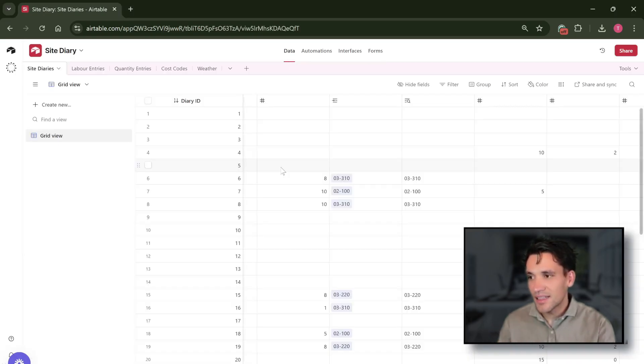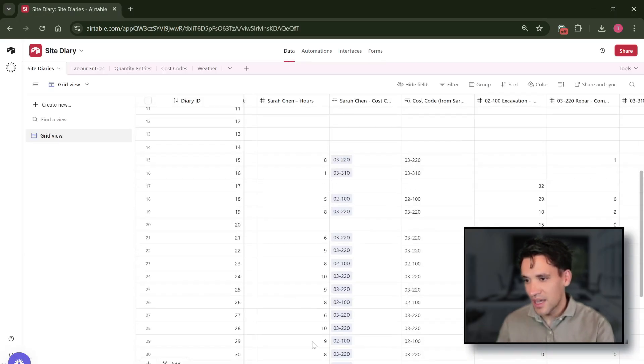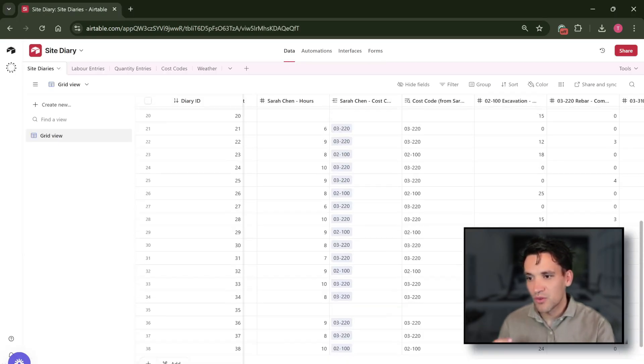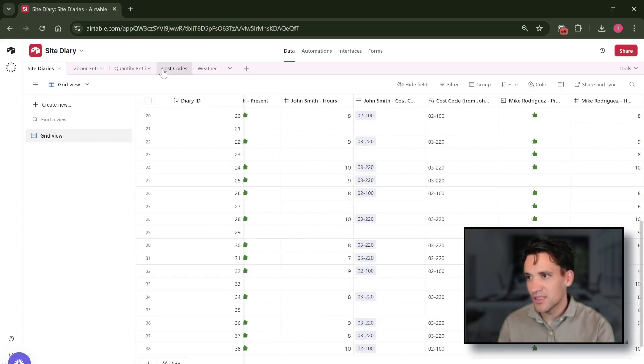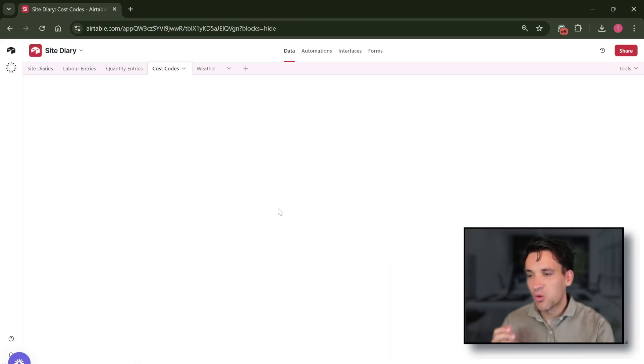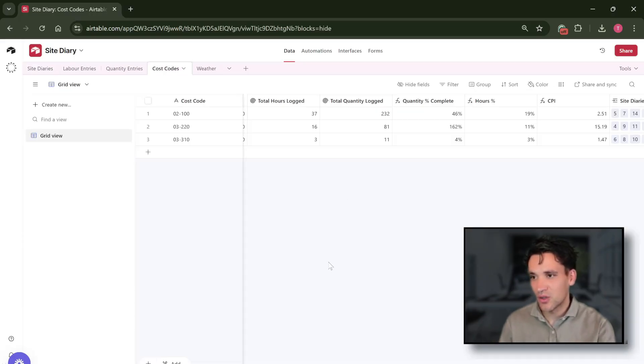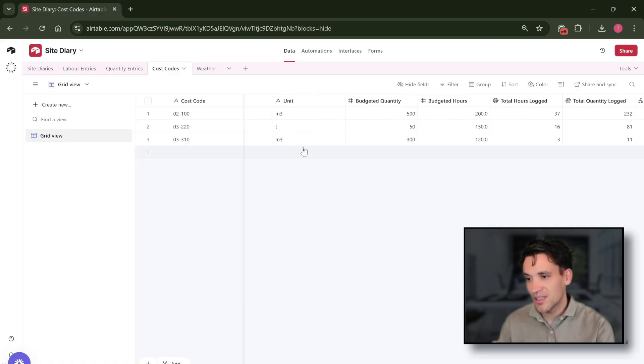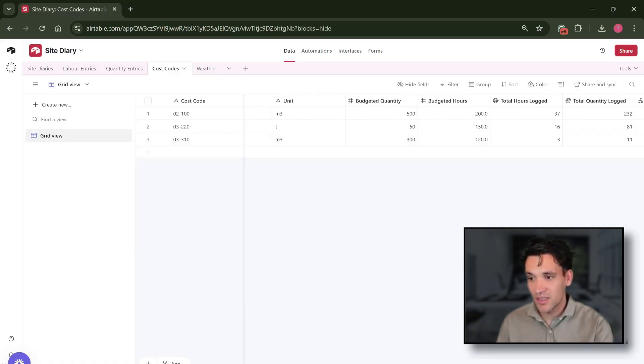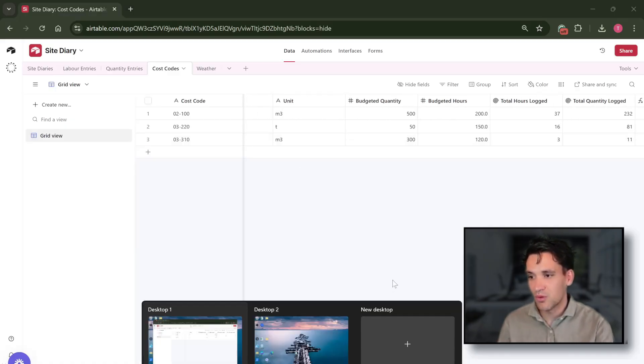This data then gets stored in a series of tables where we've got all of our site diary entries and the quantity of work completed against each of our cost codes. Again, we can change these as we want and adjust them for our project.